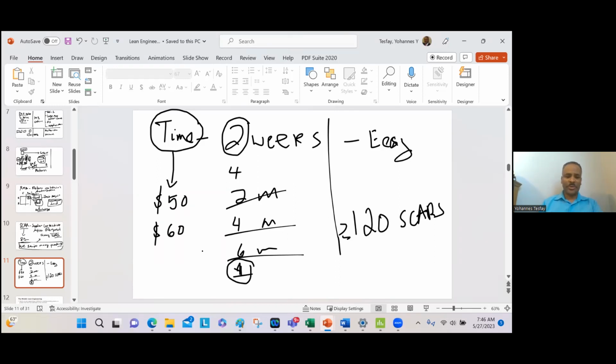How many people are involved right here? Maybe 20, or 10. It depends. When you multiply this by 20, for example, almost $1,000 hourly is being spent. One meeting costs that much money for one hour. Two hours, you double it. Now it continues for two weeks, four weeks, six.